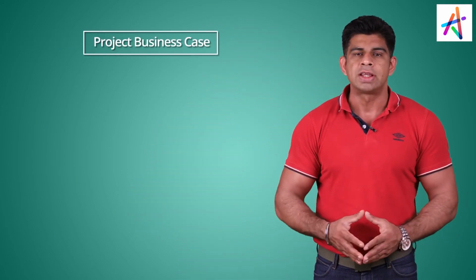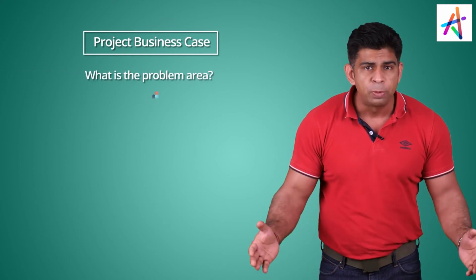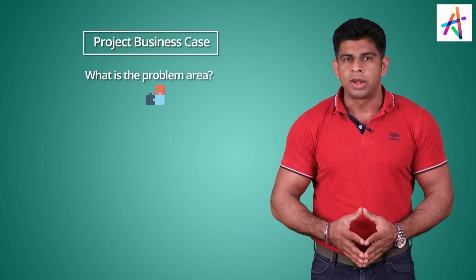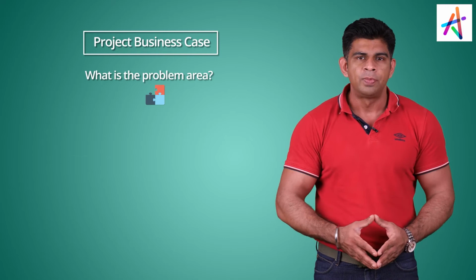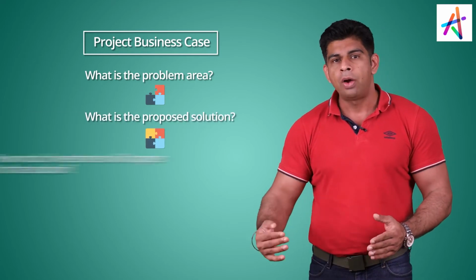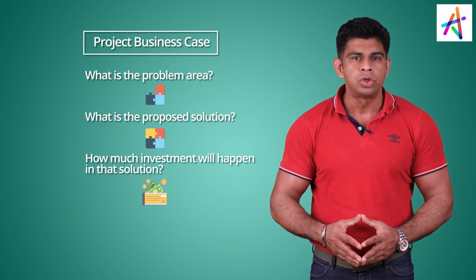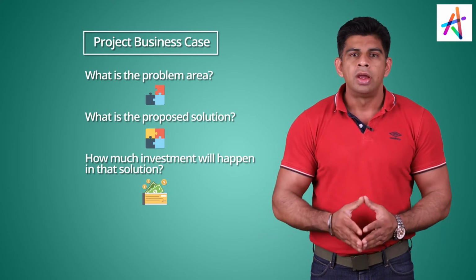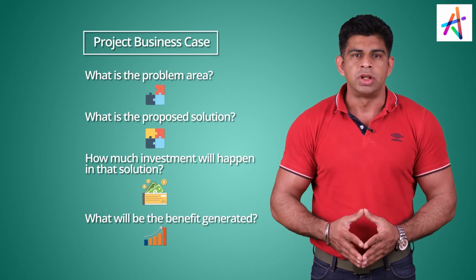We need to do a document study for that. And that's where the project business case comes into picture. What is the problem? What is the area that we are trying to take care of? Problem or an opportunity? What is the proposed solution towards it? And how much investment will happen in that solution? And then eventually, what will the benefit which will be generated?